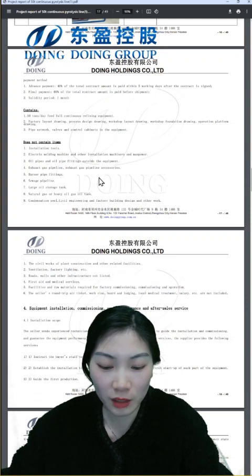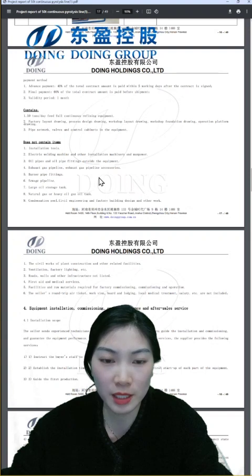During the shipping, or when there is an expected time that you receive the machine, we will ask you if you need our engineer to guide your installation, commissioning, and train your local workers. If you have your own engineer team, we support free consultation and free online commissioning. Of course, we will send you all drawings to help you. If you don't feel guaranteed, you can ask our engineers to come to your site.